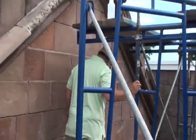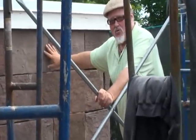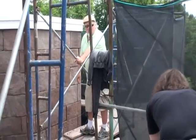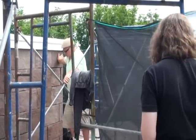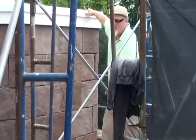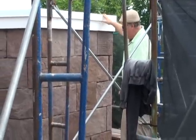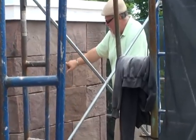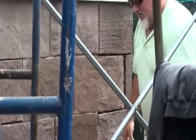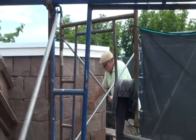Over here, we have much more finished product. We have a pallet that's closer to being finished — we quite like the shade pattern on this, and it's much more to our liking. The guys basically come up with certain mixes. You come up with maybe 10 mixes, then you get into what they call a ballpark. Once we get to a ballpark color or shade, we tweak it and tone it until we get to something that we like. Usually we end up with maybe three or four techniques for the repair of the stone.